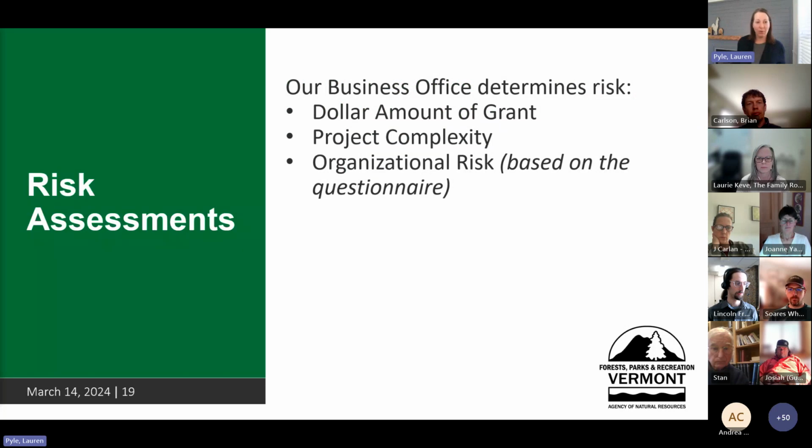And so that final bullet was there. Oh, thank you, Eve, for clarifying. It does say quarterly in the grant agreement draft, and that just means once every 3 months. So we don't have specific windows that you have to hit. Generally, it's in mid-June that we can't do any more in June, just because that's the closeout of our year. But say if you invoiced in August, the next one could be 3 months later. We don't say it's only September to December and only these months. It's just 3 months between them.